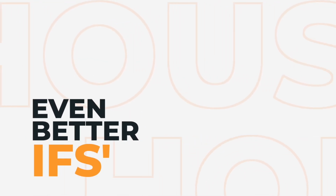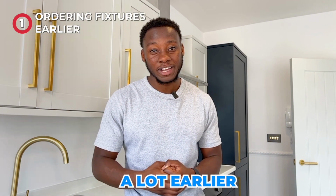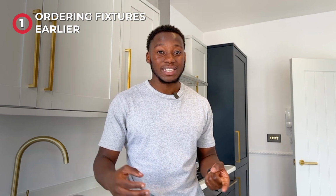Now, moving on to the even better ifs. And this list can always go on for ages. Despite where you're at and what level you're at, there's always something you can improve. And the number 1 for me is ordering my second fixtures a lot earlier, because not taking into account delays and wrong items getting delivered pushes back the schedule. Like 1 day can turn into 2 weeks, and it certainly did on this project.